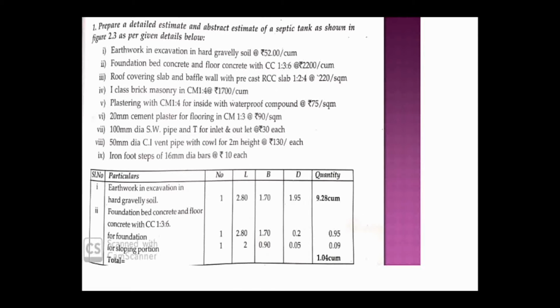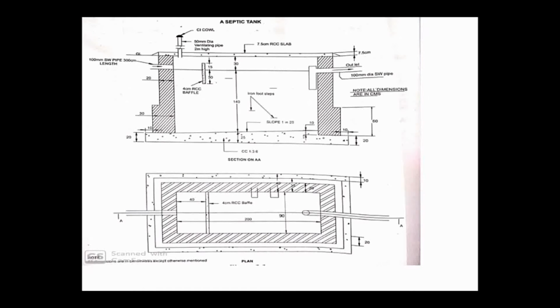So the first thing we have to find out is earthwork in excavation in hard gravelly soil. Earthwork means we know that below ground level we have to do the earthwork, right? It is the first step before constructing any septic tank. So below ground level we have to construct, so what we have to consider is below ground level, right? So in this figure, the whole construction will come under earthwork excavation.